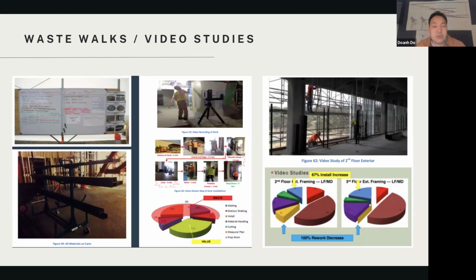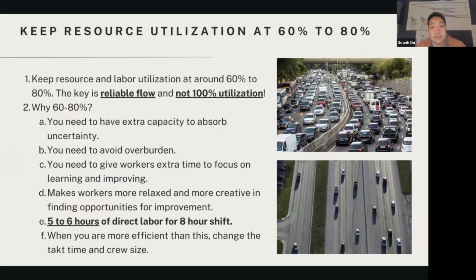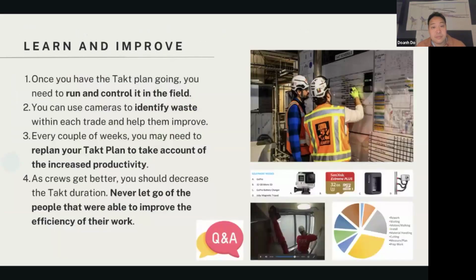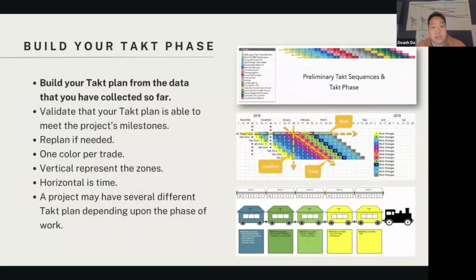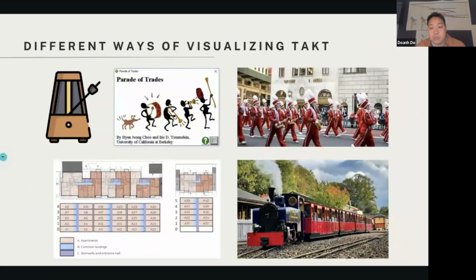If you're not disciplined, all your zones and trades just crash into each other and you fall off. So when you have a train, right? Well, the advantages and disadvantages of the takt are the same one, right? If you have a train that pulls people along, what happens when one of the carts fails? Well, everyone fails, right? That's a disadvantage of takt, but that's also the advantage, because if you fail,